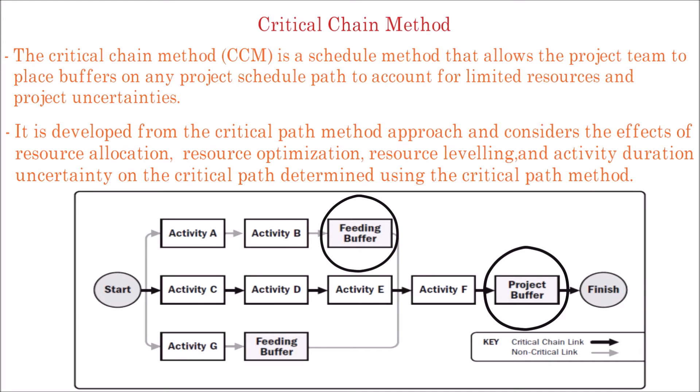The size of each buffer should account for the uncertainty in the duration of the chain of dependent activities leading up to that buffer. Once the buffer schedule activities are determined, the planned activities are scheduled to their latest possible planned start and finish dates.